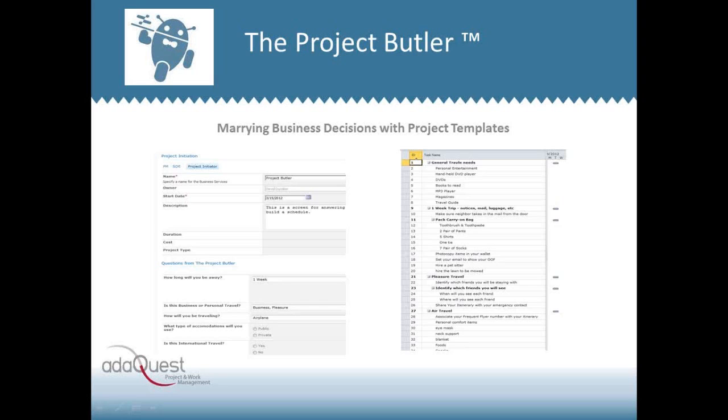click the Save button, and we create on the right a Microsoft Project schedule for you, fully with work breakdown, indentations, durations, starts, ends, resource names, anything that you can capture in Project can be created in the solution with a SharePoint custom field that will allow you to track it in the work package and bring it into Project. Okay, so let's go ahead and see this in action.